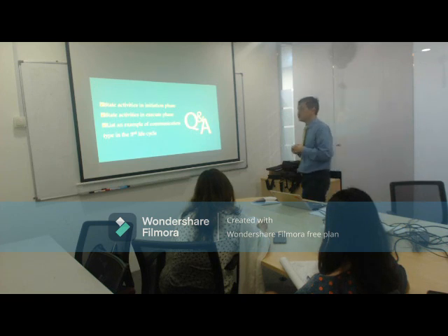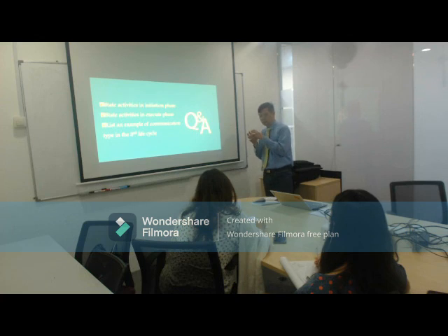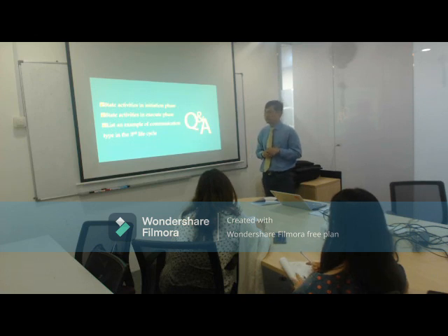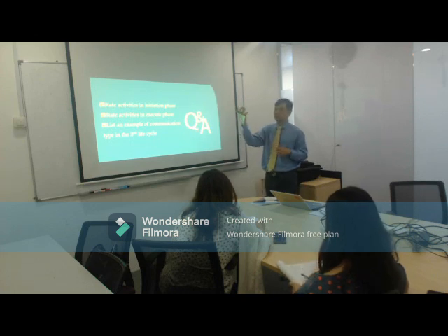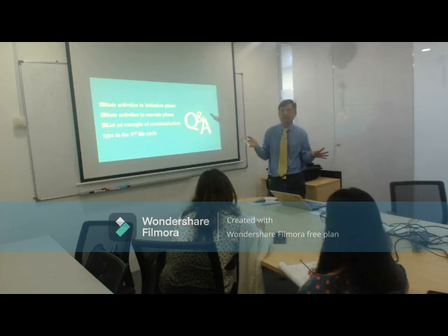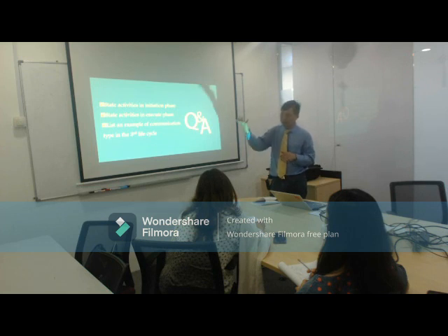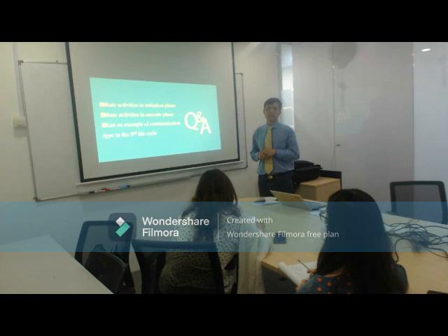The steering committee will be those people involved in the management. The sub-committees are all the small groups of people doing small activities. They will report back to the steering committee. The steering committee will be the one controlling: do we keep the project going or do we cancel the project? Or do we add money for the project? Or do we provide more time? Or do we change the quality of the project? Right, so that's what we call a steering committee.